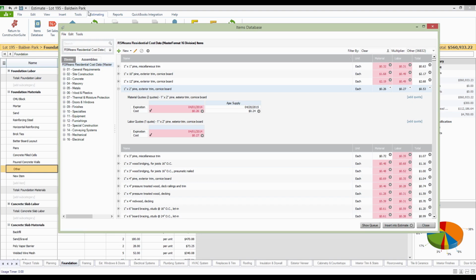When you create your own cost book, you can even import your own spreadsheets into the system to create the cost book, or more importantly, you can export it back into an Excel spreadsheet so that you can send it off to your suppliers, get them to update their own prices, import it back again, and it just updates all of your information here in this entire database.